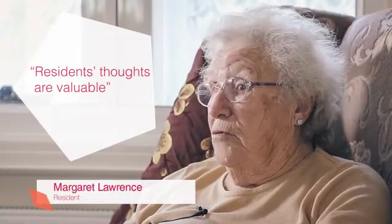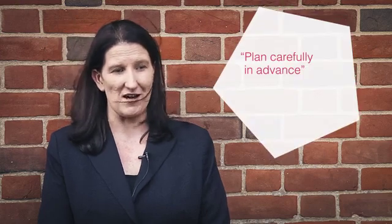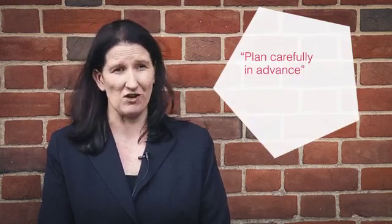We had a meeting once a month throughout roughly for about a year. One of the things we didn't appreciate was in terms of the supply chain, the long leading time for some of the key components that we needed for the retrofit. Everything was done as I asked. They looked after me very, very well.